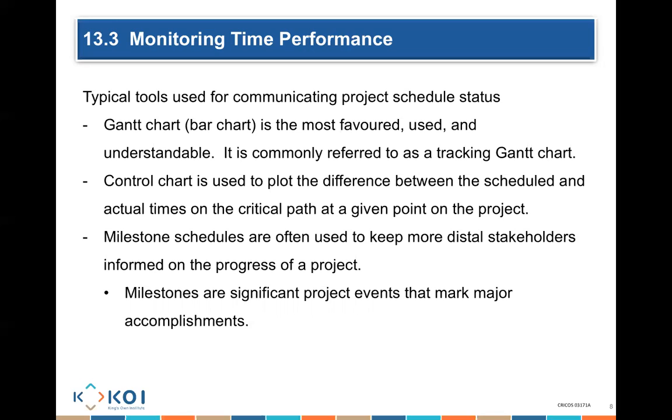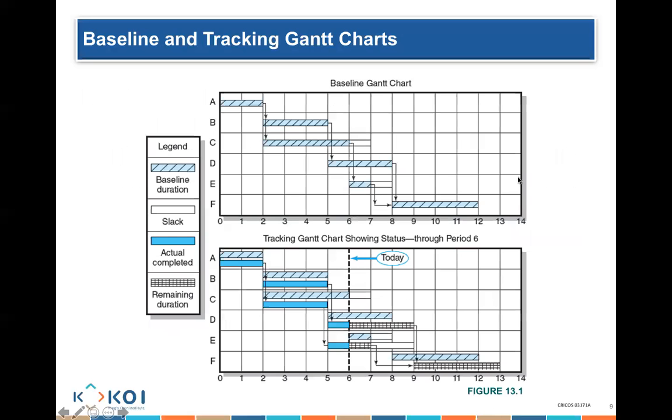That's all what I basically go and actually do. So that's what we need to know about in terms of the actual milestone. A milestone is not an activity. A milestone does not consume time. A milestone is simply a point that I put in my plan to indicate that a major achievement has been completed. When I put a milestone in my project plan, I put it as 0 days duration to show that it's not an activity that actually consumes time.